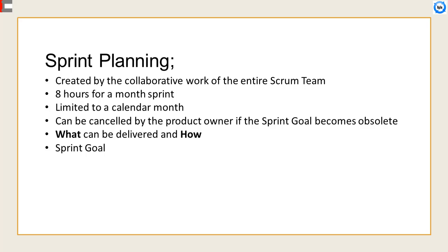The sprint goal gives the development team some flexibility regarding the functionality implemented within the sprint. The selected product backlog items deliver one coherent function, which can be the sprint goal. The sprint goal can be any other coherence that causes the development team to work together rather than on separate initiatives. As the development team works, it keeps the sprint goal in mind. In order to satisfy the sprint goal, it implements the functionality and technology. If the work turns out to be different than the development team expected, they collaborate with the product owner to negotiate the scope of sprint backlog within the sprint.